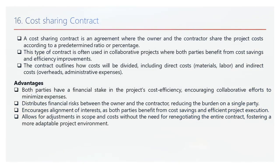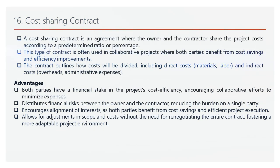Advantages. Shared financial stake: both parties have a financial stake in the project's cost efficiency, which encourages collaborative efforts to minimise expenses and optimise project performance. Balanced financial risk: this contract distributes financial risks between the owner and the contractor, reducing the burden on any single party. Alignment of interests: it fosters alignment as both parties benefit from cost savings and efficient project execution. Flexibility in scope changes: this contract allows for adjustments in scope and costs without renegotiating the entire contract, creating a more adaptable project environment.